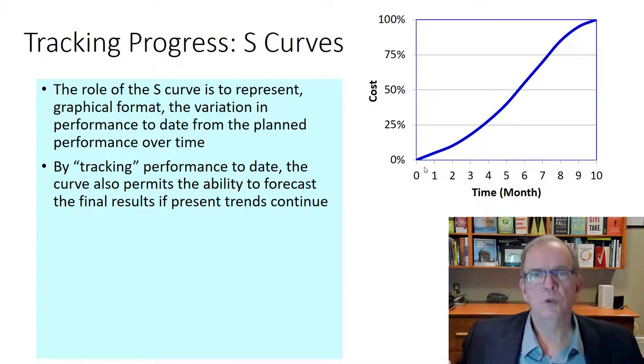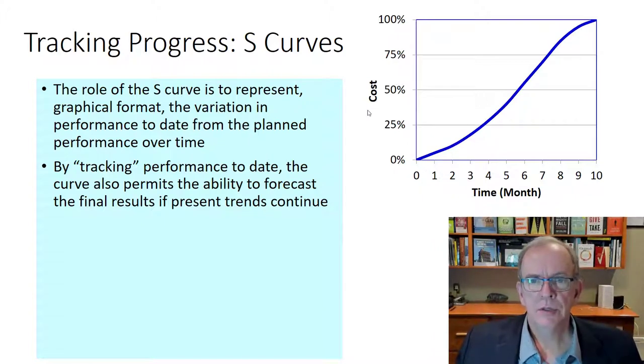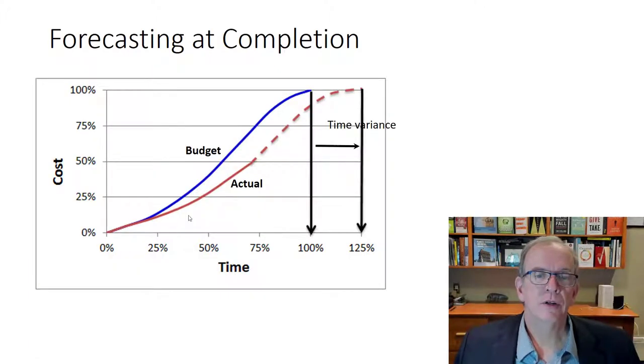People are being withdrawn from the project and you're just closing out and doing all the deficiencies, so there's a definite S-curve that you can see. As the project is tracking, you can compare the planned S-curve to the actual S-curve to see if there's a variance in time. This one could be coming up and going above, right?